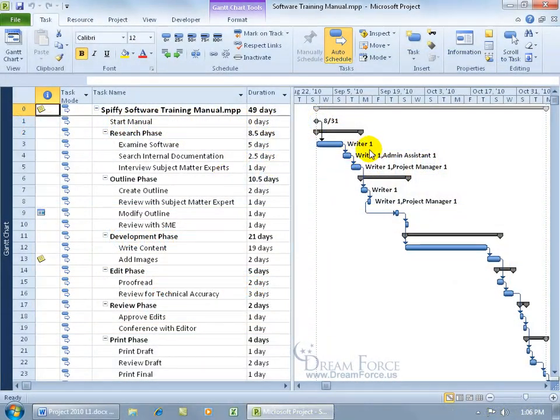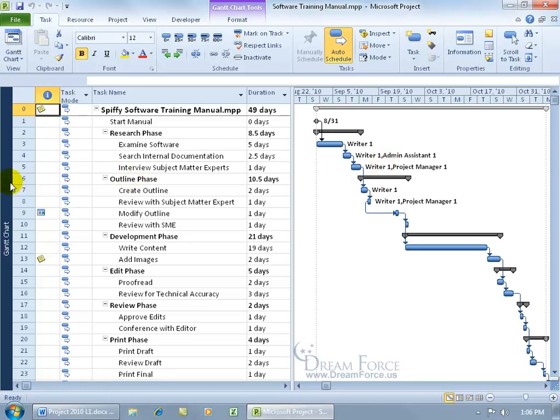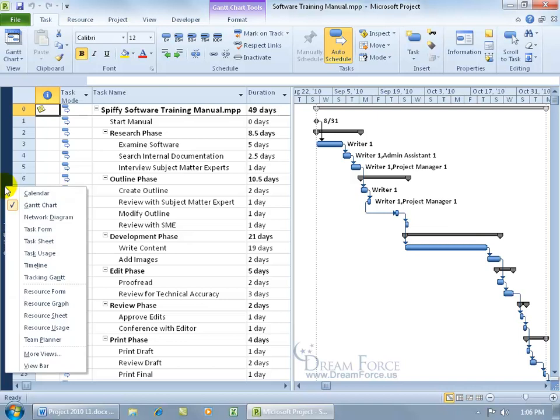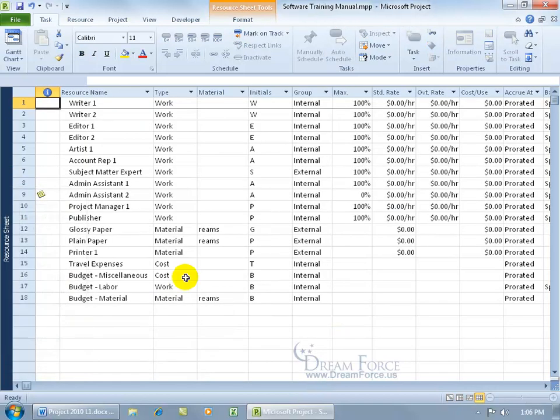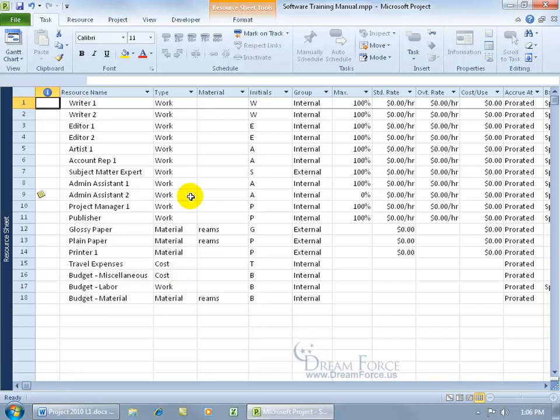Now, the resources that I've assigned to my task are not working for free. I have to enter in a cost for these resources. Let's go ahead and enter the cost by coming over here and changing views by right-clicking on the view bar and going to the resource sheet view. As you recall in an earlier training video, this is where we entered in the resources and also where we're going to assign cost to them. The three different types of resources we'll be assigning cost to are work, materials, and cost.